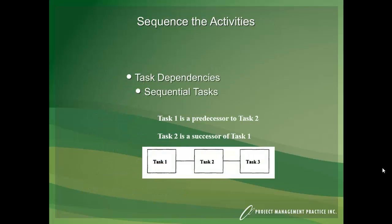So in the first scenario, sequence or sequential activities, in this particular case, we're saying task 1 is a predecessor to task 2. And task 2 is a successor of task 1. And in this case, task 3 has a predecessor of task 2, and so on.